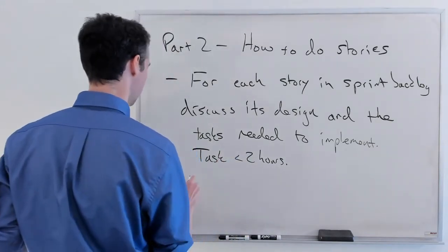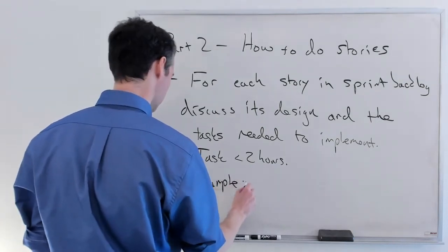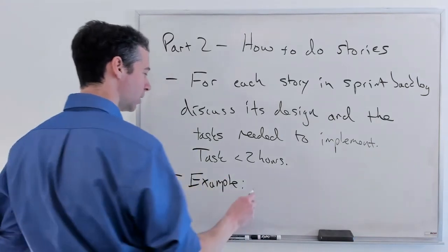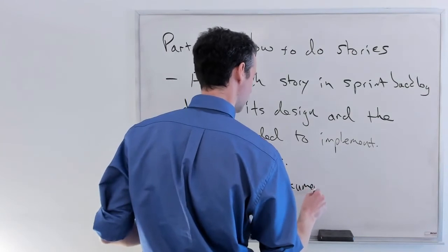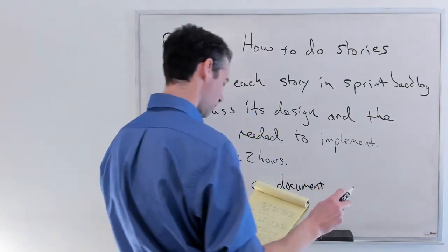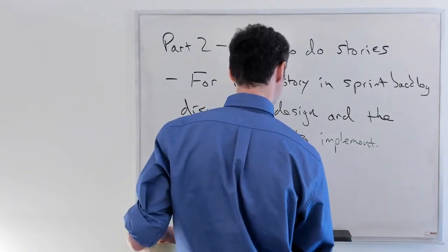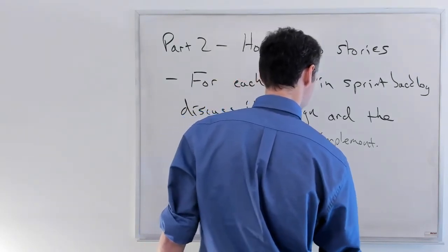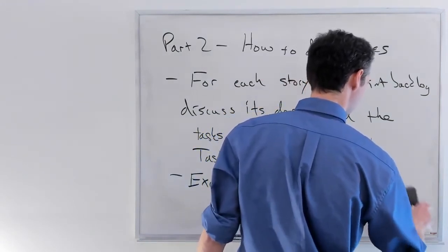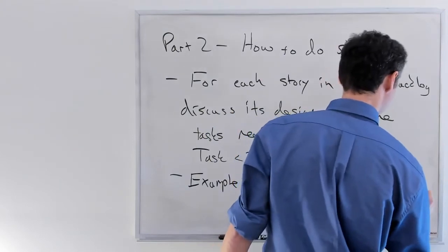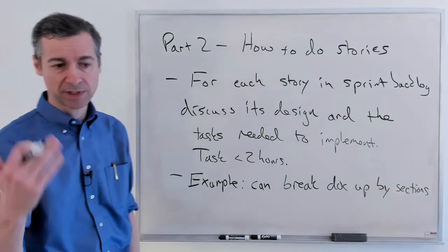But one example to give also, sometimes it takes some creativity to break up these stories. So let's say you needed to write a document. It's like, oh, I've got to write an installation document. So you can break a document up by sections. Oh yeah, I know it's going to have to talk about this, and it's going to have to talk about that. Well, those would be separate sections, and you can break them up as tasks.